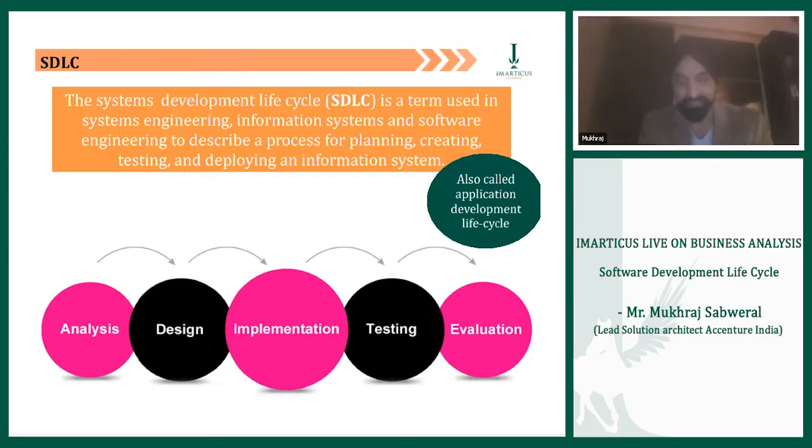All put together, Rajesh is going to arrive at a certain conclusion. He is going to bounce off that conclusion with his stakeholders. And then with a joint consensus, which is taken after arriving at a cost-benefit analysis, they can clearly see that, yes, there is a large benefit in automating our current pain shop. If that is true, then they give it a go-ahead, and the project shifts from analysis to the design phase.